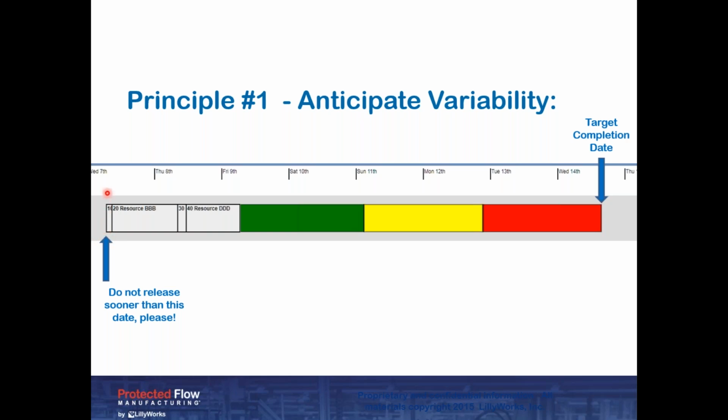So if we're controlling that across all my work orders, then I'm likely to, and most of our customers do, have an initial significant drop in the amount of work in process that they see. Over a 6 to 8 week period, many companies will see their WIP drop at least 20%, sometimes up to 30 or even 40%. Okay, so that drop in WIP now enables much better flow as well.